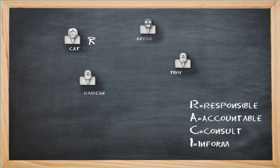Responsible stands for basically the person that performs the work on the task, and there can be multiple team members with this responsibility role. Greg is Accountable - we put an A there. That person basically is the one responsible for approving the work. The person that is accountable is typically the one who approves or oversees the work, and there's usually one accountable person on a given project.